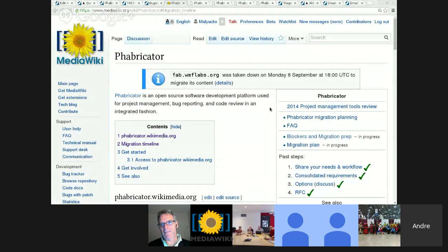Well, it does say plural. I mean, if you go to the project page, there's a link to Workboards, and everyone I've been to either hasn't been set up or you just see one. But it would make sense to have previous sprints or backlog or things like that. Maybe if the problem is the plural S, then it's the plural S which is the problem. The truth is that as of today, one project is one workboard, and if you need more workboards, then you need more projects. Oh. Okay.